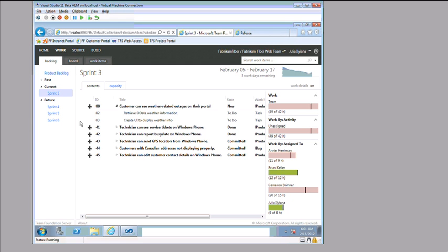Well, we might remember that what we saw back on the home page was that the team had already committed. They had a total capacity in this sprint of 42 hours, and they'd already committed up to 39 of those hours. So we just added 10 more hours. We blew their math. And this is going to kind of blow out the sprint, which is a reality for a lot of teams that are trying to do Agile.